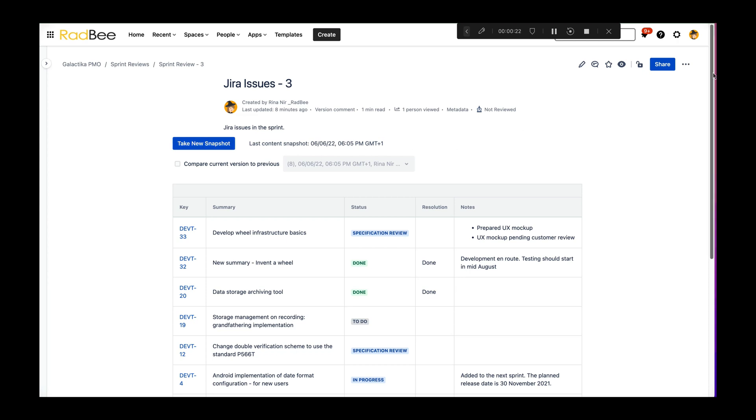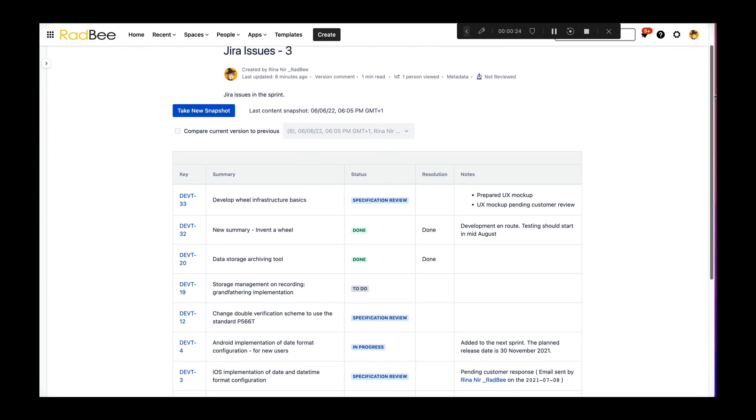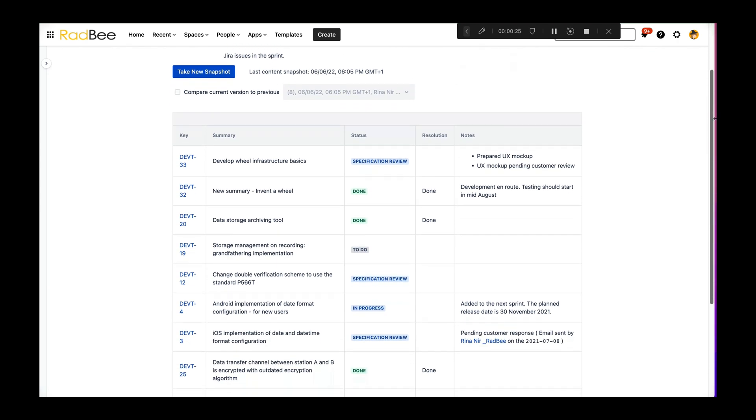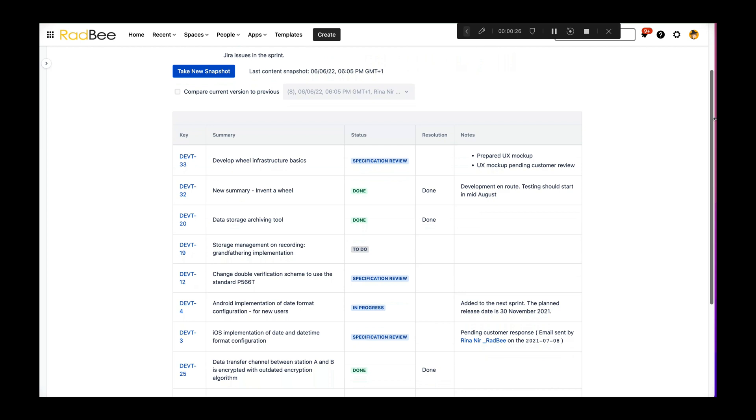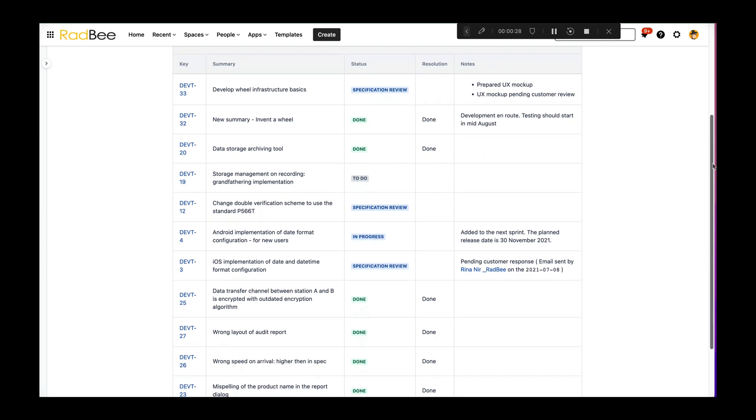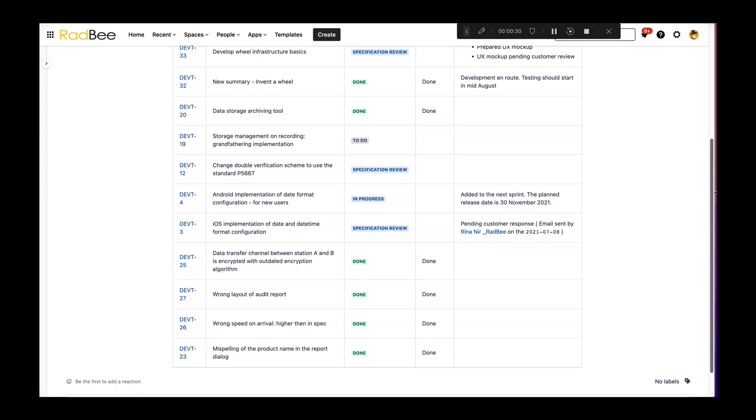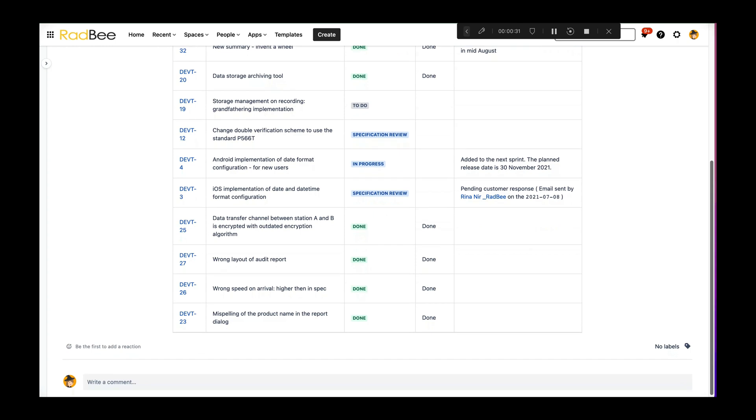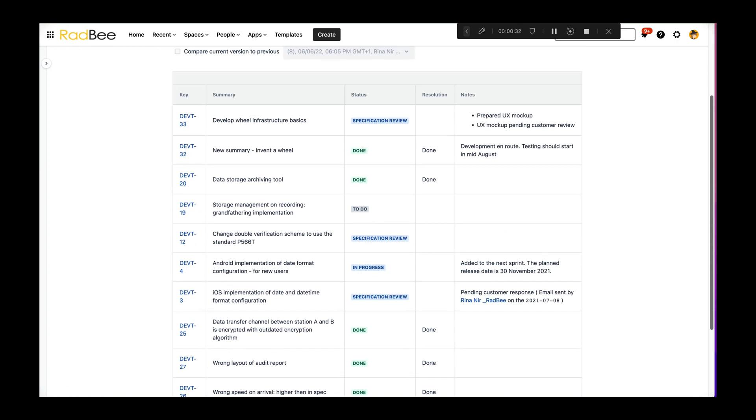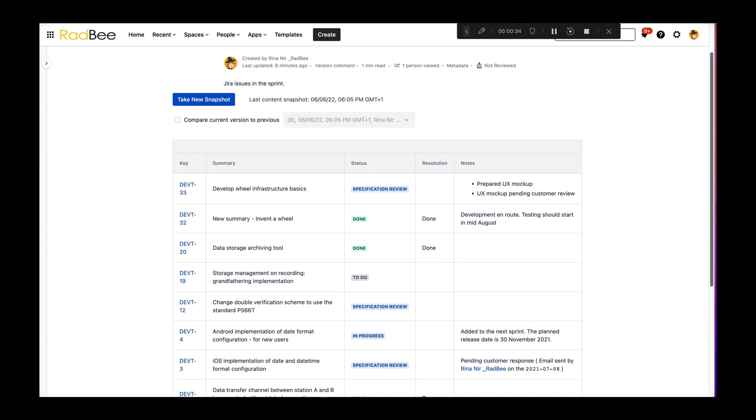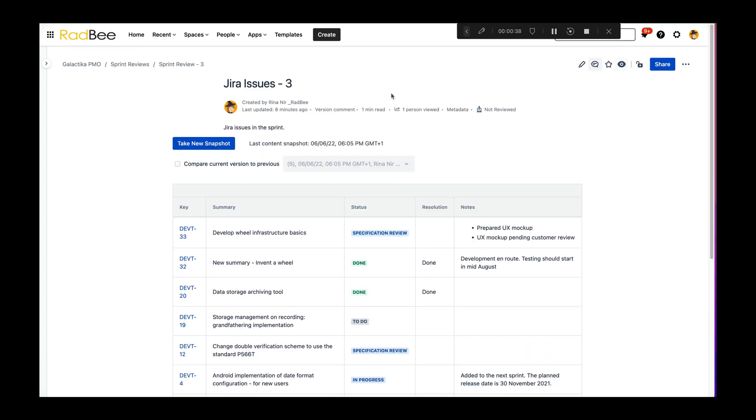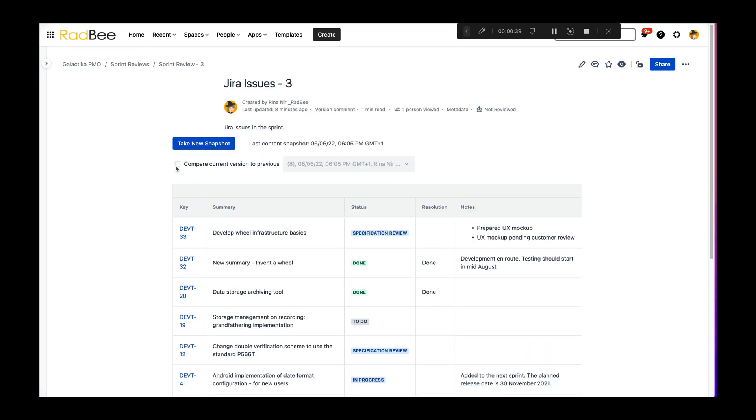This table is a snapshot of Jira data as it is at the end of the sprint. Anyone with access to the page can see exactly the same data, even if they have no license to Jira. We always take a snapshot at the beginning and at the end of the sprint.